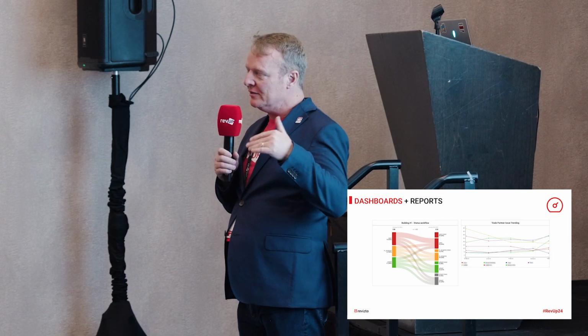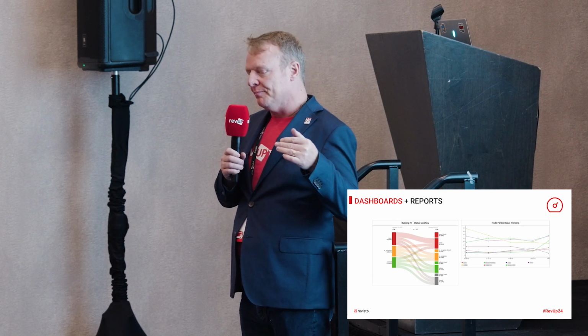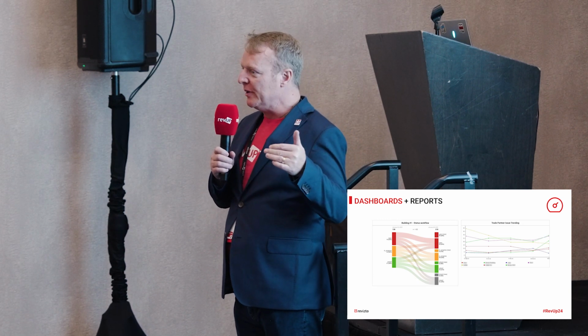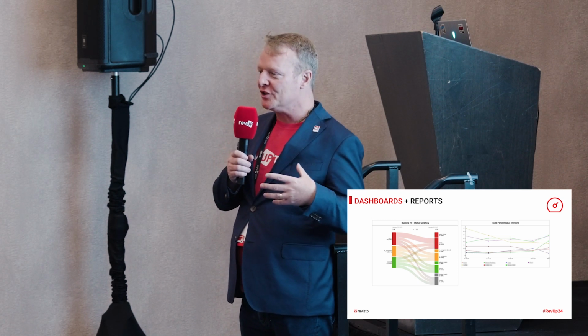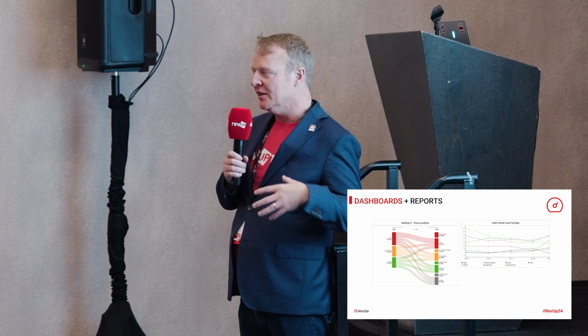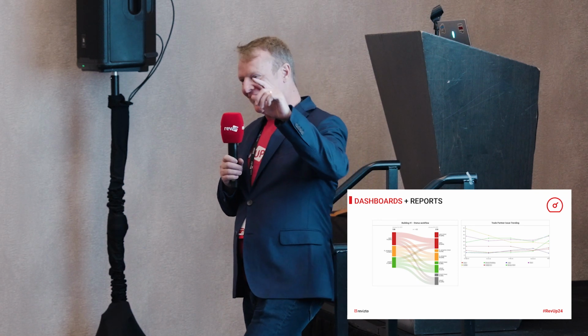And I said, remember two weeks ago we had a DTM, a design team meeting, and the client instructed a big change? And he goes, yeah. This is the impact on the coordination of your project because of that change. He's like, oh, so it's a good idea if we give the design team more time to finish the coordination then? I was like, yeah. And the line went down again.